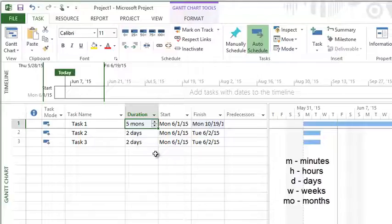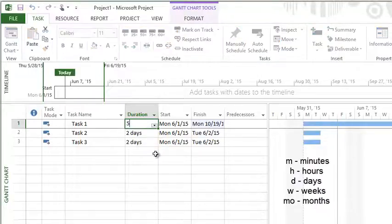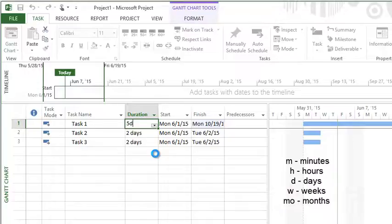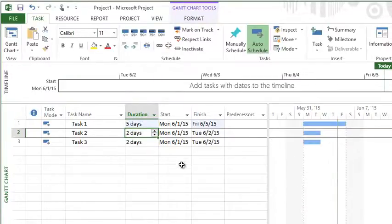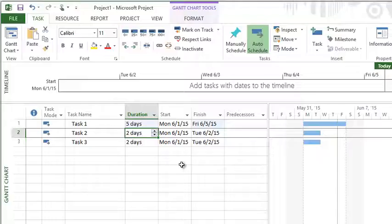Typically I don't find myself using weeks or months. I find that can be misleading for people. So if I said a week to someone as a duration, they might think seven days and I think five work days. There's too much confusion there.